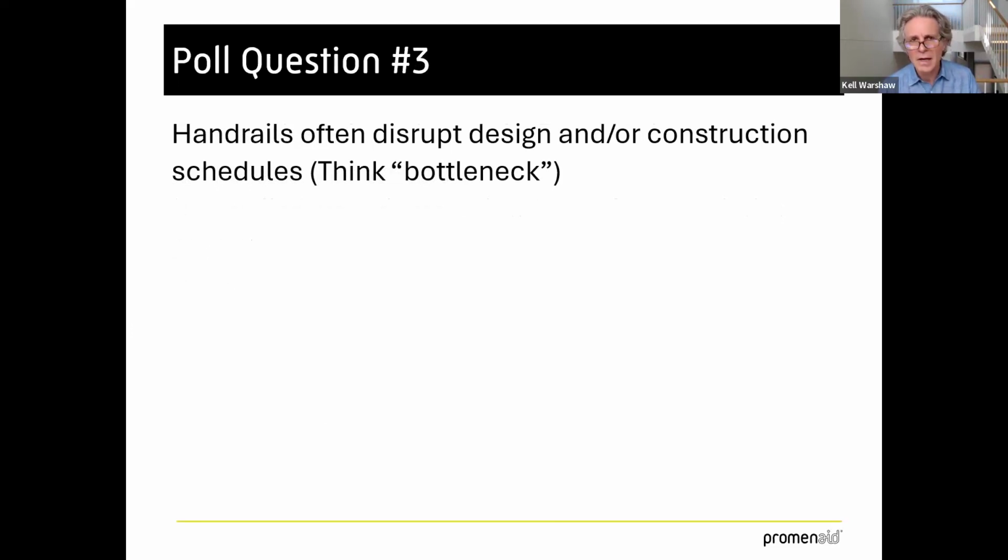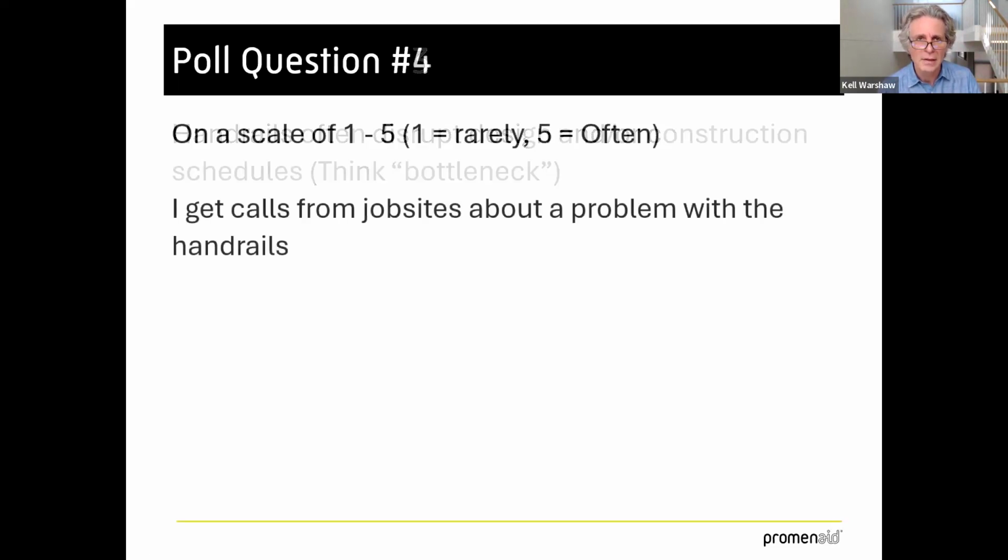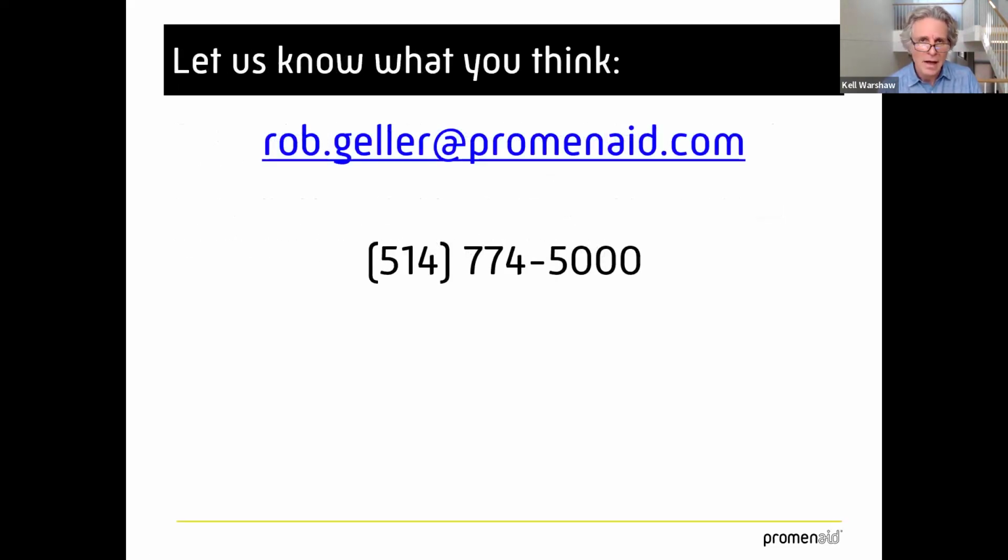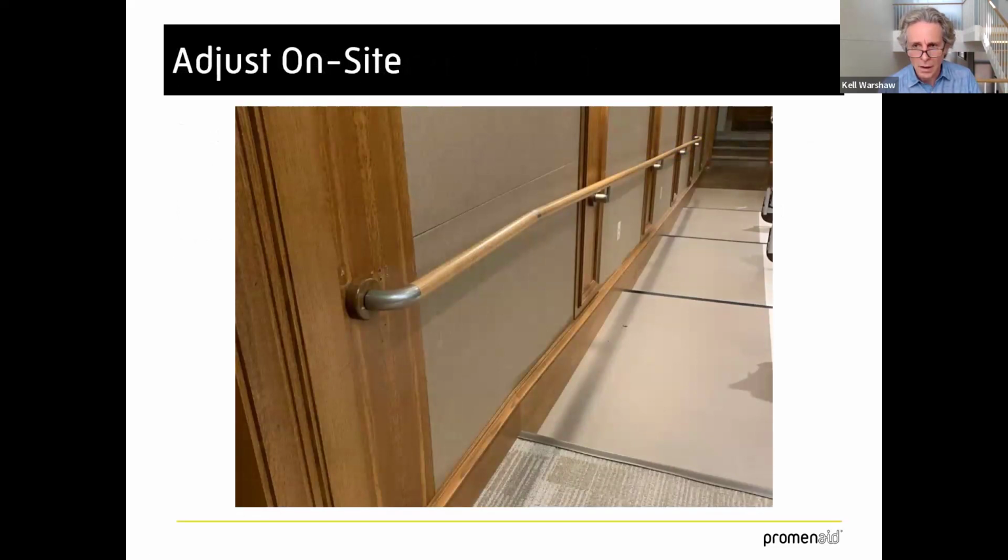But in the end, because the handrail is going to be defined by the location, we allow that to happen because you can get right up till the final build. And then with the short lead time and the on-site adaptability, the handrail will work with that location rather than having the handrail lock in a design too early in the process or require expensive modification too late in the process.